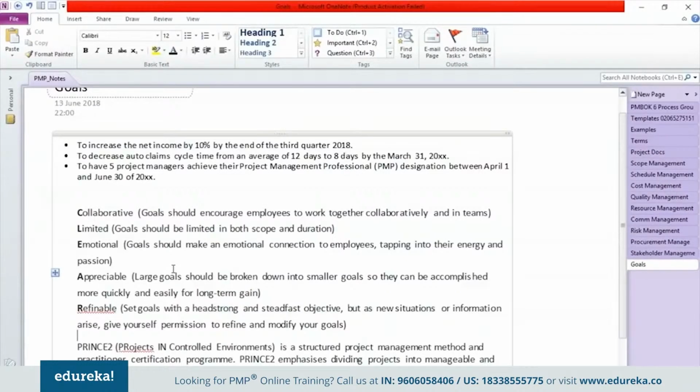As I was mentioning some time ago about digitizing the entire banking experience, that's a very big vision. If you just start executing or working on this, it will be very difficult to execute. But if you break it down, so that I want to digitize the customer experience for retail banking, all the retail banking customers who come to the branch and may fill out certain forms in a physical way. Now I would like to use maybe tablets or computers, putting them up in the branches so that people can come and fill that up.